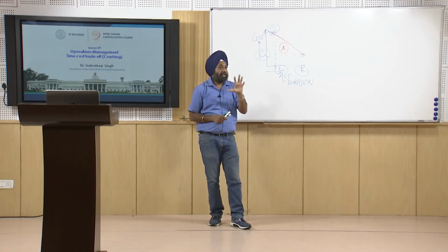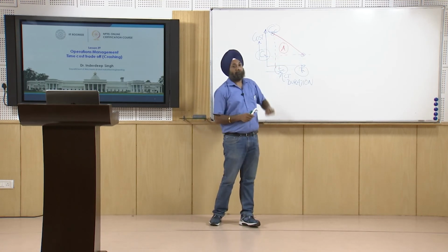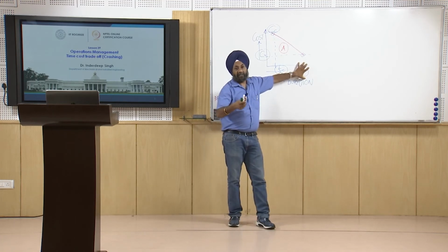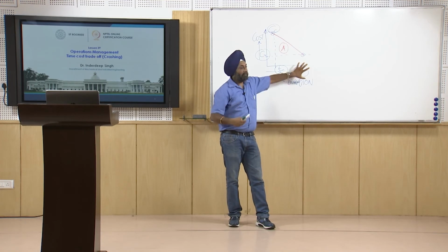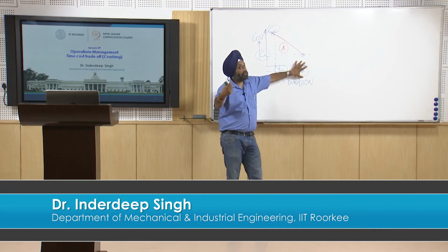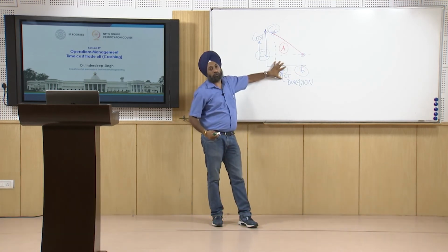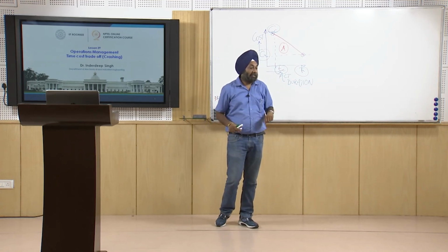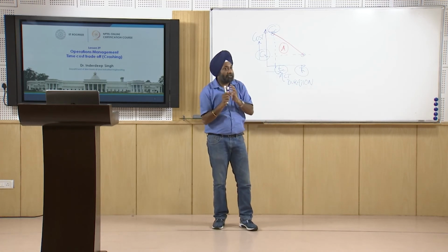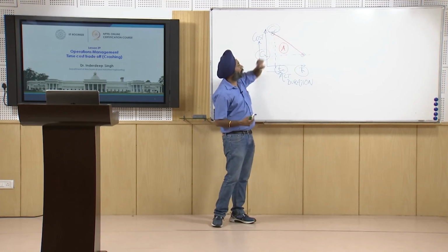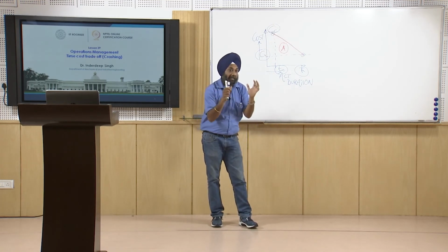That is, for every activity, like here we have activity A, we must have the normal duration that we normally have. In case of CPM, for every activity we have got a normal duration. I think it is clear to everybody. But in addition to that, we must have a crash duration also, that is, what is the possibility of reducing the duration of that activity. Similarly, we must have the cost data also, that is the normal cost involved for completing the activity in normal time and the crash cost involved for completing the activity in the crashed duration.